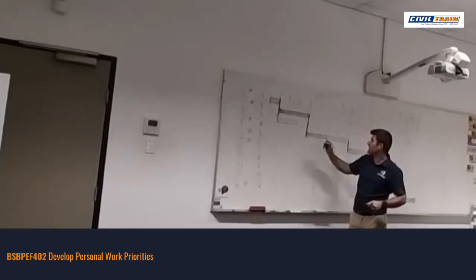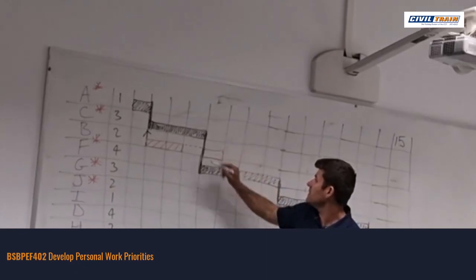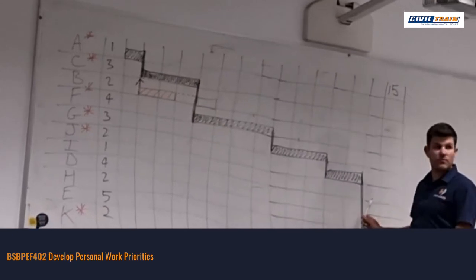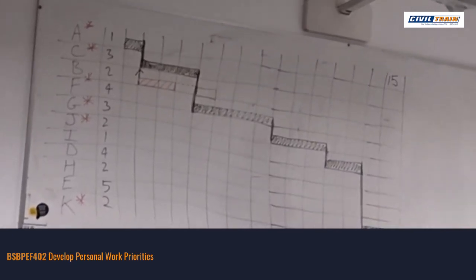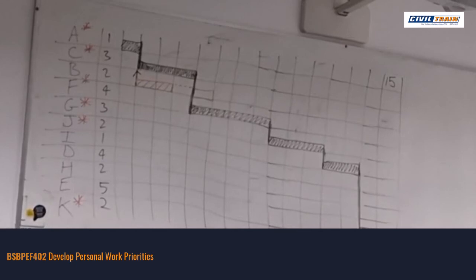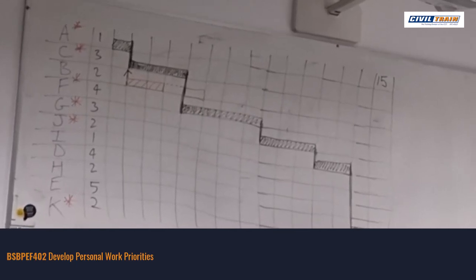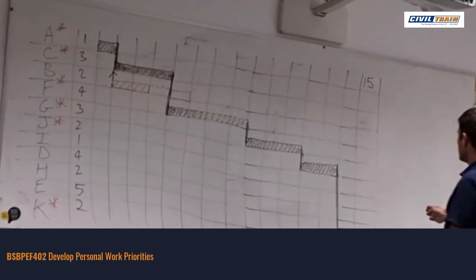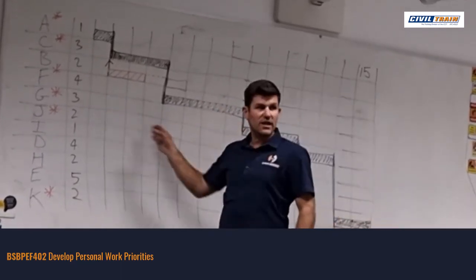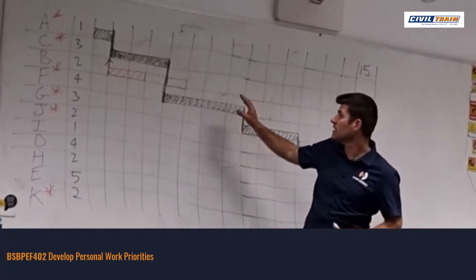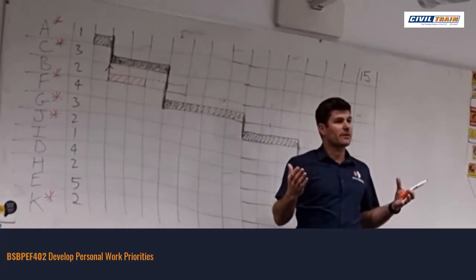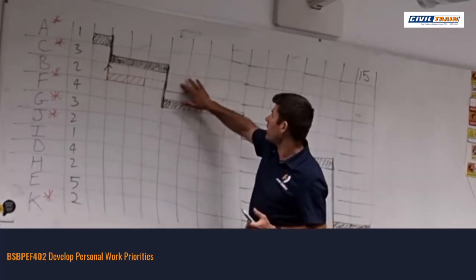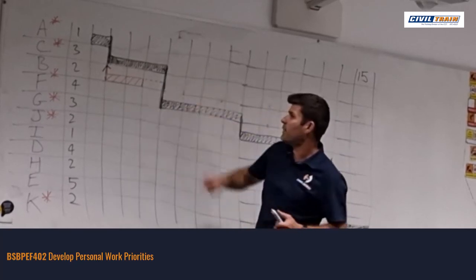But if I was to slide that and bring it out here and cross my critical path, what happens to my whole timings? It gets blown out. As soon as something ruptures over that critical path, then my project's longer. So it shows you that anything that can be completed within this critical path, my floating tasks, will not affect my time frame. And you often see that on some of the programs where they've overlapped, and that shows you that they've been affected. So it does highlight where you had some movement for that one.